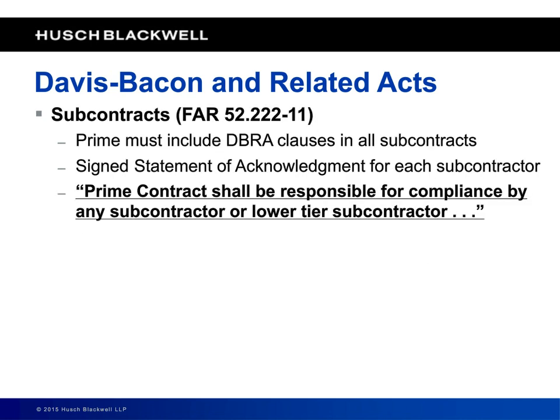If that didn't get your attention, let's talk about the last clause I'm going to talk about before we get to best practices, and that is the subcontracts clause. What that clause says is, you, prime contractor, shall flow down all these Davis-Bacon Act related clauses, and I'll show you, I have them all listed here, into all your subcontracts, and that you shall get a signed statement of acknowledgement, it's called a Standard Form 1413, from each and every subcontractor at any tier.